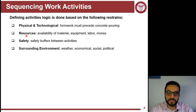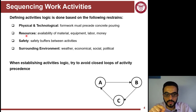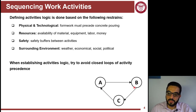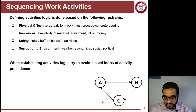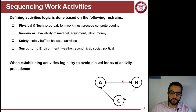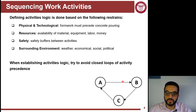While building the network of logic between activities, be careful about creating endless loops. If Activity B depends on A, C depends on B, and then you mistakenly say A depends on C, you have an endless loop. Scheduling software will flag this as a clear error. Logically, an endless loop means the work would never get done, so one of those links is a mistake that must be fixed.